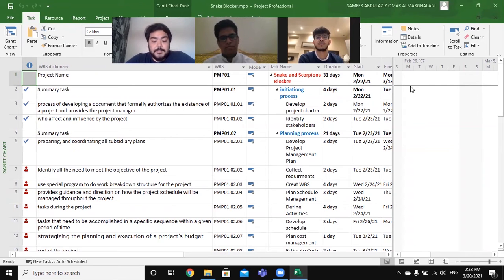Resource rates are used to calculate the resource assignment costs, which are rolled up and summarized at the resource level. Each resource can be assigned to multiple tasks and multiple plans, and each task can be assigned multiple resources. The application schedules task work based on resource availability as defined in the resource calendars.